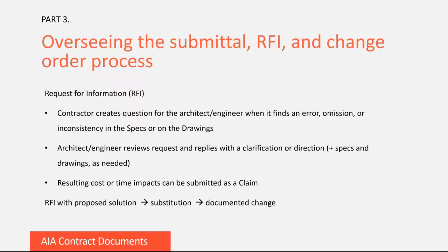Traditionally, owners expect their architect or engineer to come up with a solution, but I think one way to have a strong contractor-owner collaborative relationship is taking steps like this, which shows the contractor is invested in the project and looking for a desirable outcome for the owner. Now, proposing a solution may trigger a substitution, so be sure it is then documented with a change order.